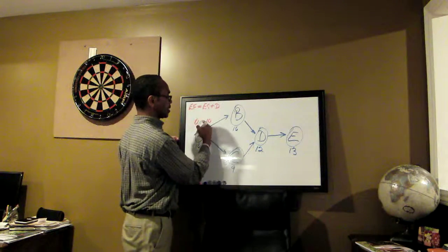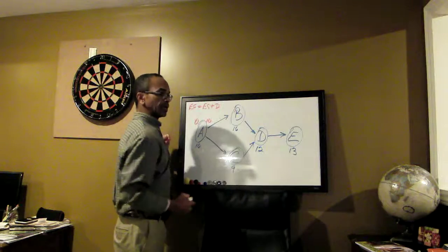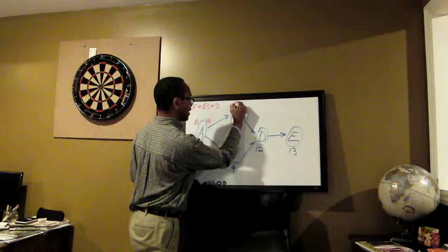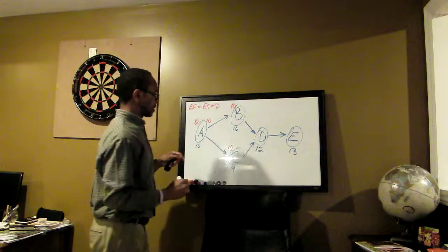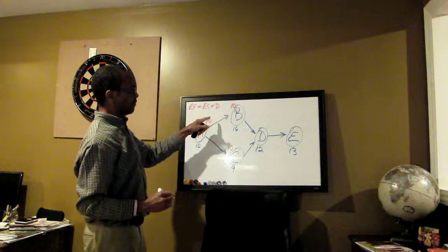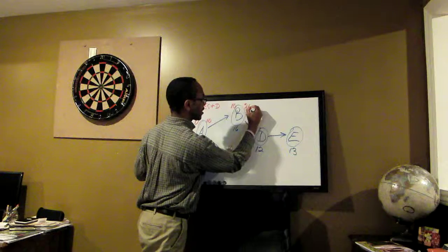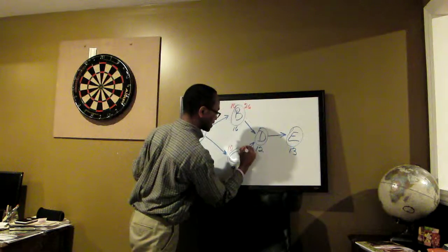We take our early finish over to the next activity. Right? So it's 10 here. Should we put 10 at C? Yes, we should. So we apply the same formula. 10 plus 16 is 26 for your early finish here. And your early finish on C is 10 plus 9. That's 19.